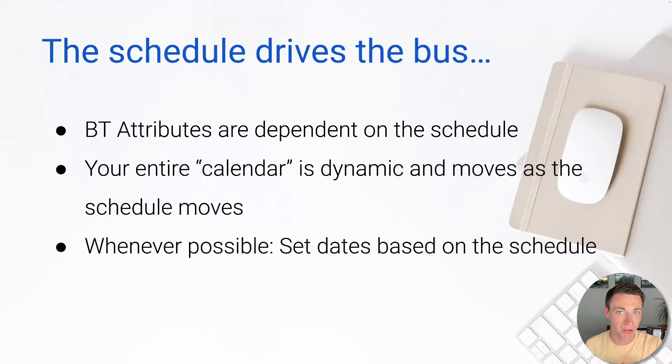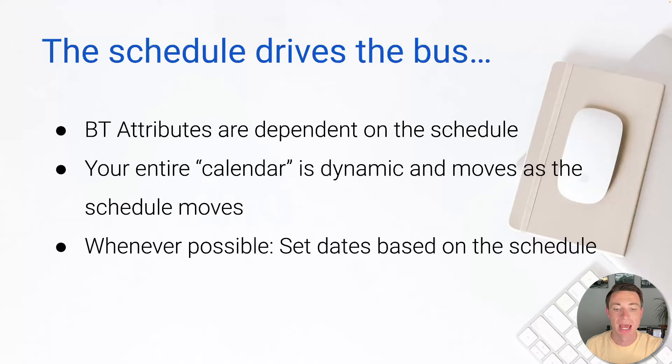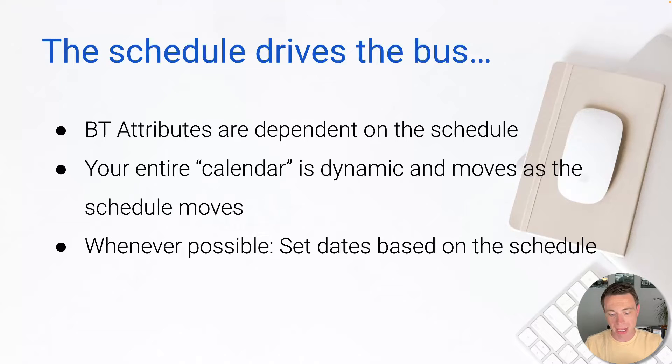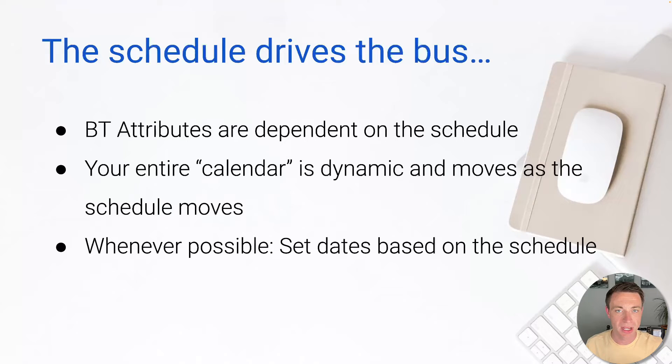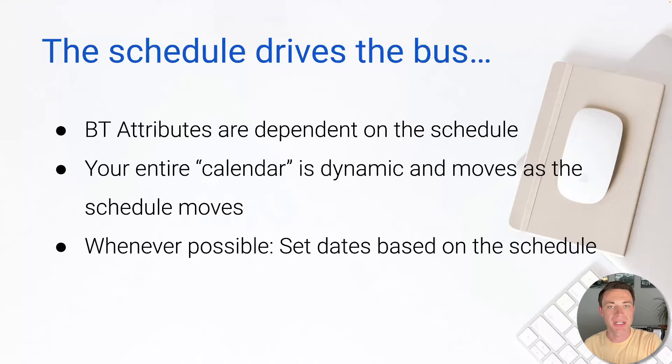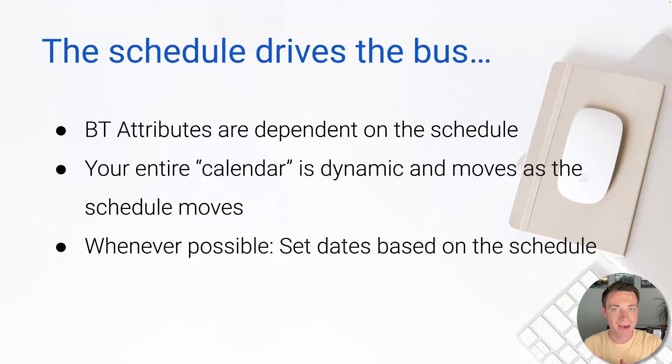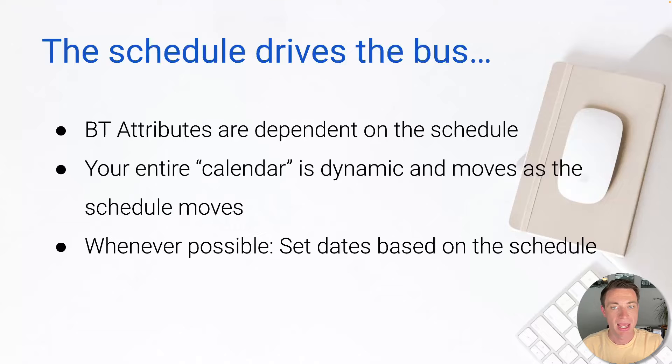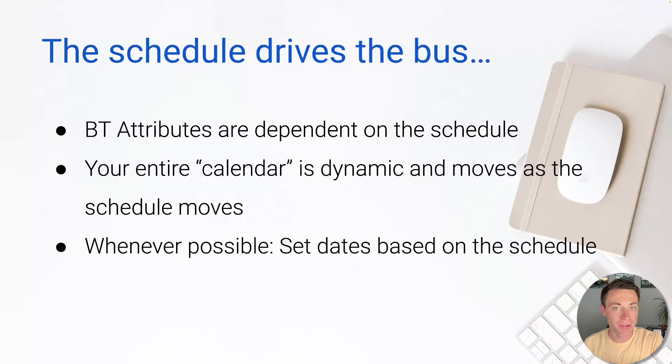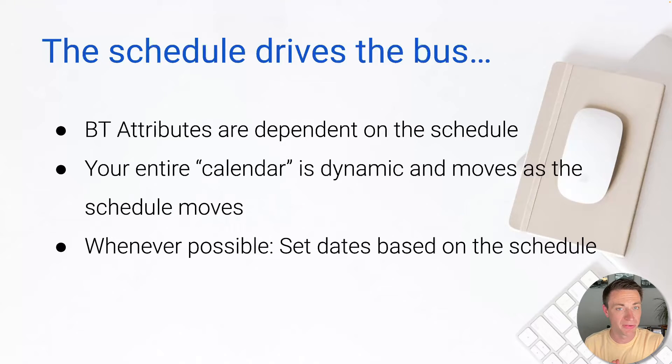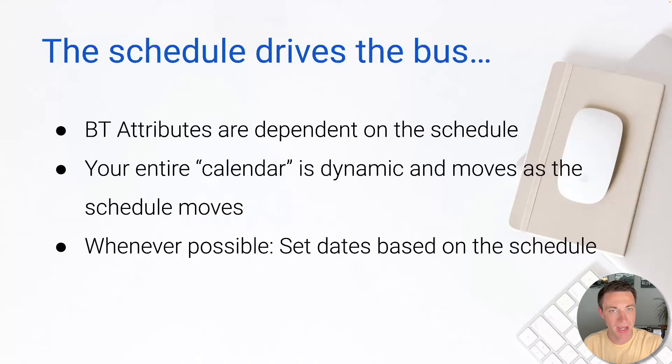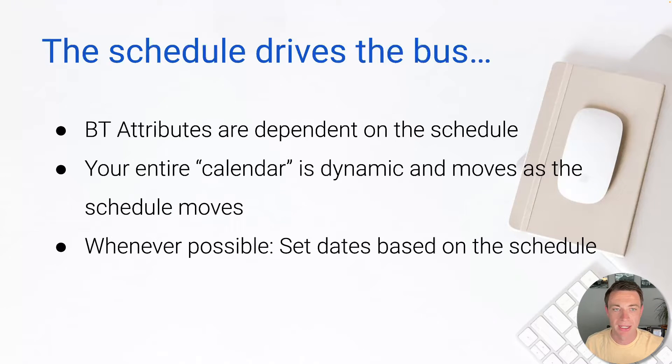Whenever possible, whenever you have the opportunity, I want you to set your dates based on the schedule. That's going to save you a ton of time. Remember that most of the things that you do within a construction project are dependent on where the project is at in production. So if you have a task that is due, that due date is probably determined based on where the project is. And therefore, if the project moves, that due date for that to-do probably moves as well. Not every time, not all the time, but most of the time. So I'm going to show you that today.